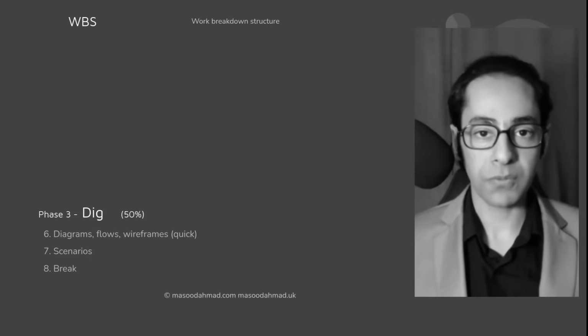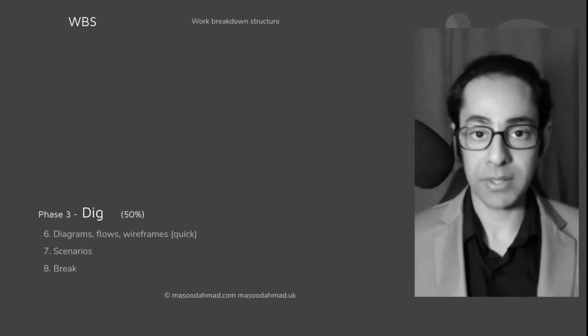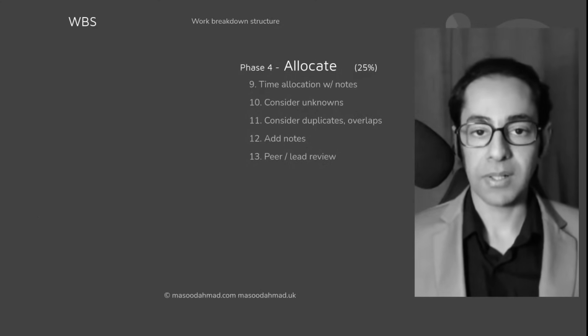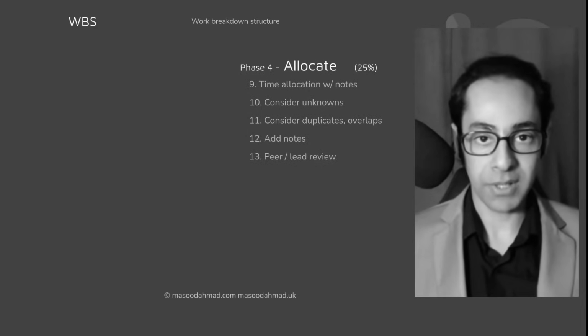At this stage, you will find out that the structure you made in step number 1 has changed. This is normal and this is good. Update that structure. Phase 4, allocate. Now is the time to give time estimates. Not before, now is the time.